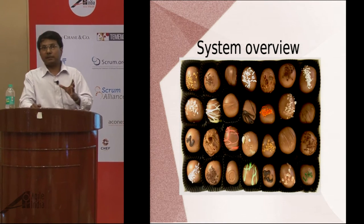In terms of productivity, the main thing measured was velocity. However, velocity should not be measured across squads, since the squad composition is very flexible — increasing or decreasing in team members. To account for this, a lot of one-on-ones were done to ensure alignment of the employee with the company's objectives, and to assess whether the employee was able to commit to and deliver on the expected work. These were the primary determinants for performance.